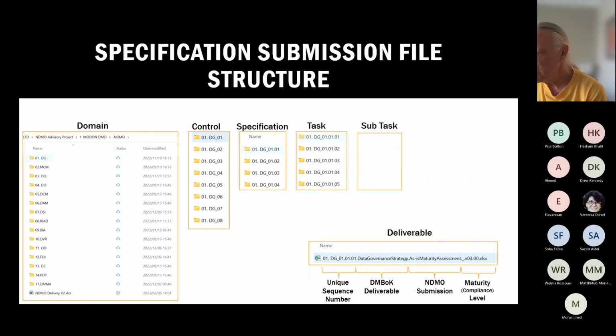What I did was, Paul would submit the work. I would then check to see whether it was right. I was happy with it, so I would change it to a V0.99 or 5. Then the project owner would say, okay, I accept this deliverable, and it goes to 2.5. We could use automated Power BI to go through and check all of our submissions across the 709 deliverables.